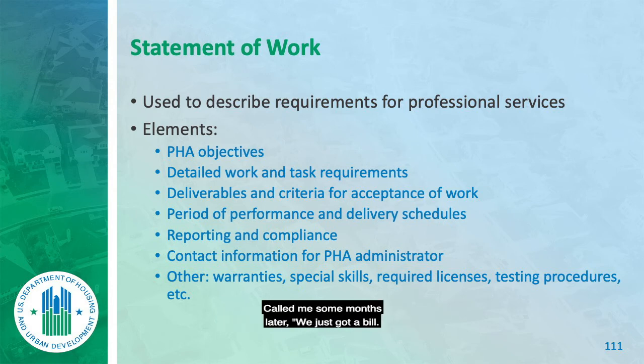Called me some months later. We just got a bill. They cut them twice a week. Pay the bill. Why? You said as needed. You left it up to them. Pay the bill. We don't want to. Well, what do you want from me? Their spec was weak, flawed.